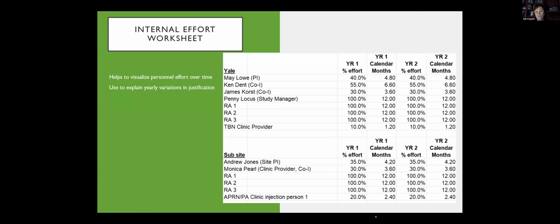They have a ton of work to do at the end, because they're the ones who are going to be working with the data, helping you write the paper, present it. And often that happens after the funding is over. So I would always have a really good conversation with your statistician to say, I'm funding you, but you need to keep some of this money.